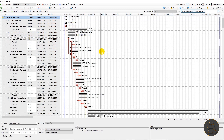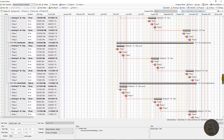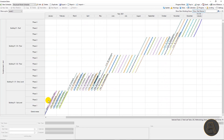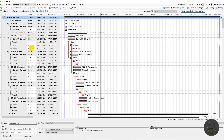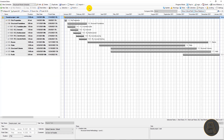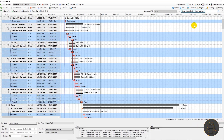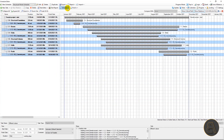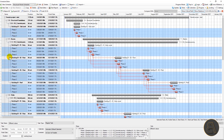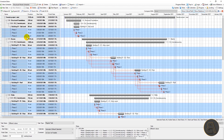We can pop out the schedule so we can see it in full screen. All tasks are automatically generated with all required relations. We can also check the line of balance and we can see it looks correct — all activities are properly scheduled on corresponding levels and zones. We can notice that all tasks have a default 40 working hour duration, and we can easily change those. Let's click on selection and choose select leaf tasks, then change their duration to 32 hours and click apply. Now let's change duration of all concrete pouring tasks to 16 hours by typing 'concrete pouring' in the filter, selecting all those tasks, and changing duration to 16 hours. Click apply.